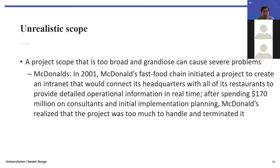Here's a famous case study: McDonald's in 2001. They initiated a project to create an internet system that connects the headquarters with all of its restaurants in the USA, to get better control of operations in a real-time manner. That's a good idea and pretty doable nowadays, but at that time with internet we needed physical layers and had to run wire to all locations. After spending around 170 million dollars on consultants and initiating the project with implementations already planned, McDonald's realized the project was too large to handle and terminated it.